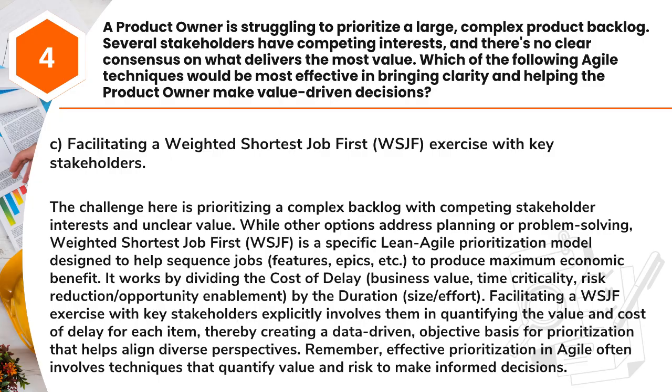Facilitating a WSJF exercise with key stakeholders explicitly involves them in quantifying the value and cost of delay for each item, thereby creating a data-driven, objective basis for prioritization that helps align diverse perspectives. Remember, effective prioritization in Agile often involves techniques that quantify value and risk to make informed decisions.